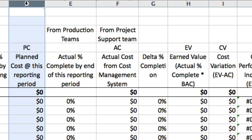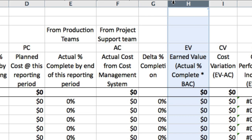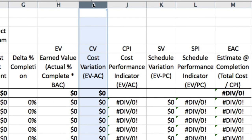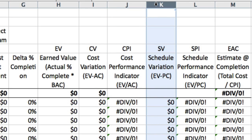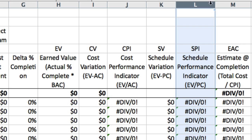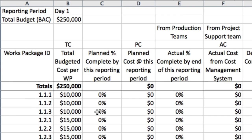There are also columns with formulas. Column D is the planned cost at this reporting period, calculated from the work package total planned cost and the planned percentage complete. Column G is the difference between the planned percentage complete and the actual percentage complete — not used in earned value management calculations, but an early warning sign of things going off track. Column H is earned value, calculated from the percent actually complete and the budget at completion. Column I is the cost variance, the difference between earned value and actual cost. Column J is the cost performance index (CPI), a ratio of earned value to actual cost. Column K is the schedule variance, the difference between earned value and planned cost. Column L is the schedule performance index (SPI), a ratio of earned value to planned cost. Finally, column M is the estimate at completion: total budgeted cost divided by the cost performance index.